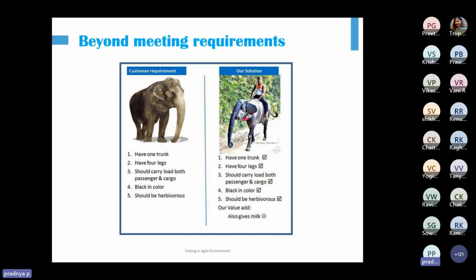If all the requirements are purely known, if the technology is set, no one will go for the agile methodology. Agile methodology will work when the requirements are still in the discovery phase. The requirements are still evolving, right? The technology that we want to use is not very stable. And then the agile practices will help you to build a product incrementally by understanding the requirements that are continuously changing. That's why typically in those scenarios, agile practices are followed.